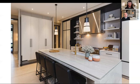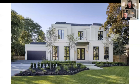Well, we have about 8 months, and 8 months is a very compressed time. 8 months to build a house at the best of times would be extraordinary, a house of this size. We've got over 6,000 feet on the 3 levels, maybe even 7,000 feet on 3 levels. So a house like this would take double or 2.5 times the time. Now that 8 months includes the design and the permitting.